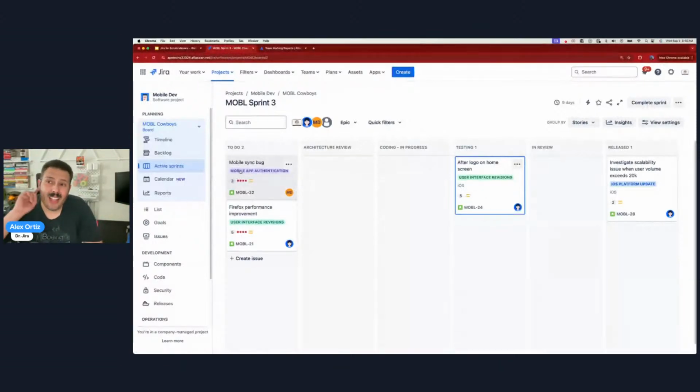And a couple of things that you want to listen for as we start wrapping up here into the last few minutes of this training, right? A couple of things you want to be listening for is your team working on something that isn't in the sprint? Because that's really, really bad. And then going back to Vanessa's point from earlier, if your team is working across 3 or 4 different Jira projects or sprint boards, they also then need to go to 3 or 4 different stand-ups, which are now taking 15 minutes out of each one, which is now you lost an hour every day, right? Obviously, if you're going across 4. So it's not very effective for your team members to be so cross-pollinated like that, right?